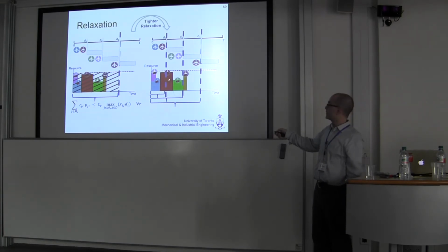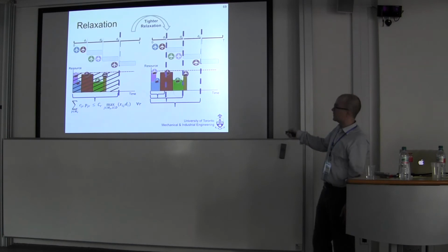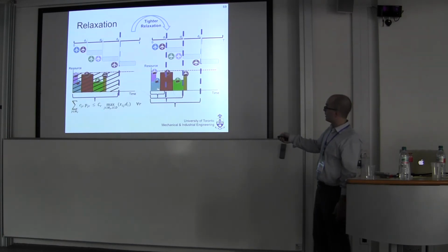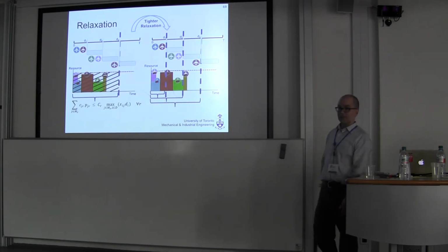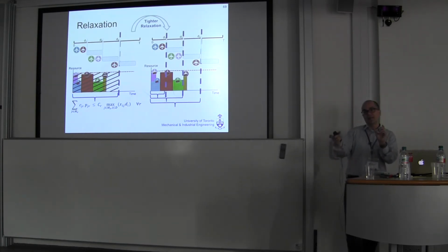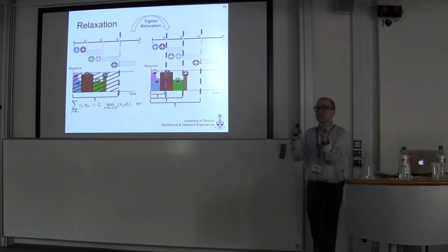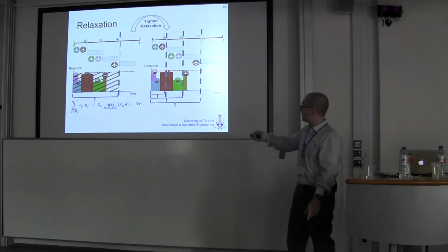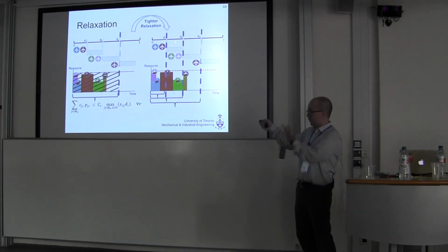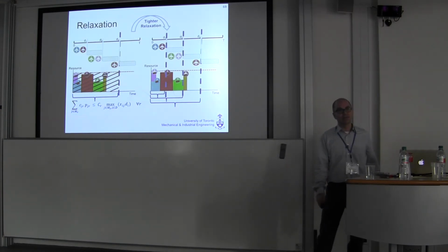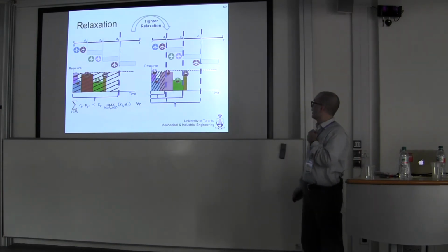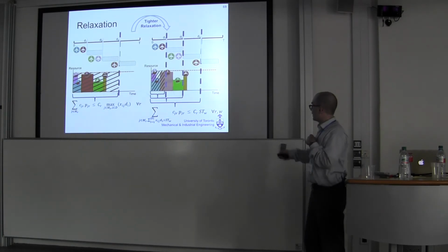That's fine. And so that means that in this interval, I want to do the blue, or the cyan, the red, the green, and the purple by this interval. By this smaller interval, I want to do the cyan and the red, and by this longer interval, I want to be able to do them all. And so now, instead of having n squared, a quadratic number of these constraints, I just have order n of them, actually order due date of them, one for every due date. Believe it or not, that's what that looks like.